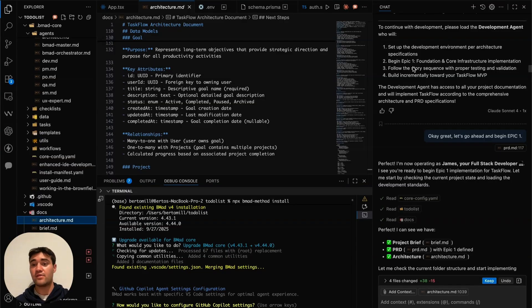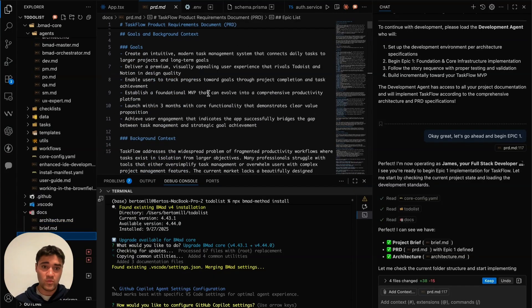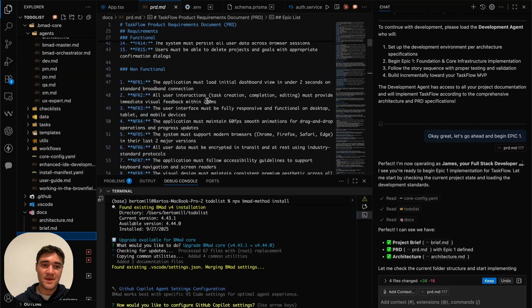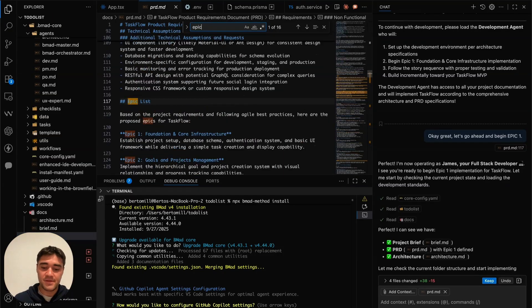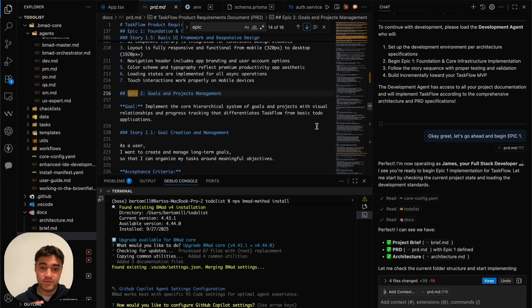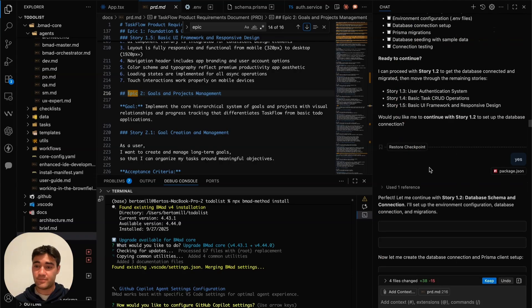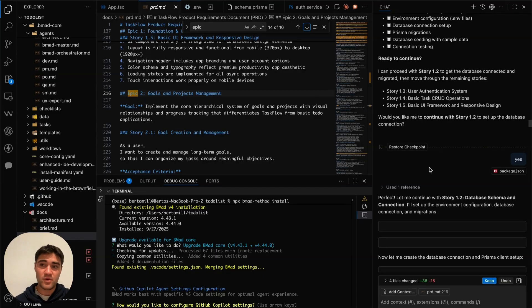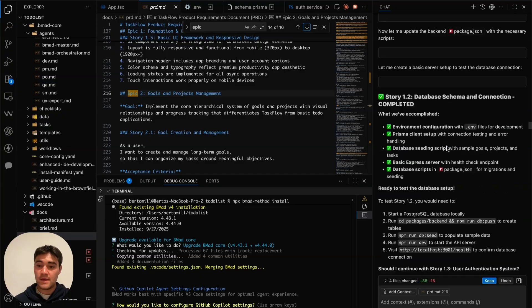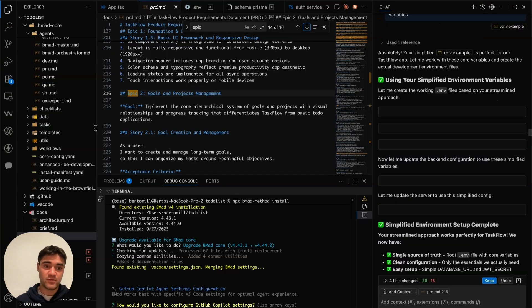In agile software development the cycle is broken into epics — this project was broken into three epics with subtasks under each. If we go to the project requirements document, we can see each epic and its subtasks, which really helps guide the developer agents. One skill that becomes important here is the ability to switch tasks effectively and work on something else for three to four minutes while the agent is doing work. I set up notifications so when the agent finishes it will notify me — you can add that in VS Code settings.